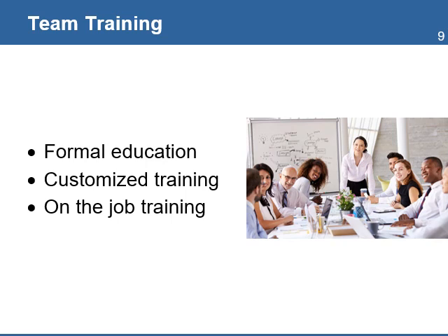Training is a way to supplement or build the skills of the project team, but training is expensive, and it consumes time that the team could have spent executing the project. One alternative is to use a blended approach that mixes customized training, on-the-job training, and coaching.